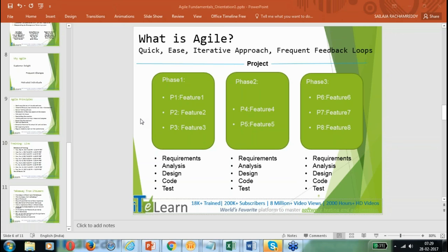So what are the benefits of using Scrum against Kanban? Here we should understand what our project is about. If it is a typical project where we have the requirements and regular feature deliverables, then yes, we can go for Scrum. But if we are going for a maintenance project where issues come very frequently, your prioritization changes and you cannot wait for the 2 week sprint, that is where you will get into the Kanban mode.